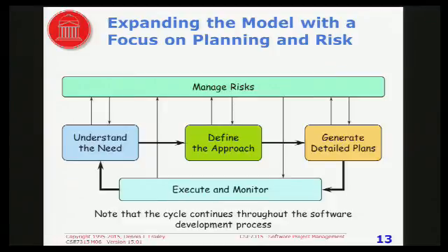So, for example, let's suppose you decide you don't have enough programmers who know Java, and it's becoming very evident that you're going to need more. That might be based on one of the arrows going up. And therefore, management decides to reassign programmers so that the people who know Java are used where they're needed. And that is an example of an arrow going down.